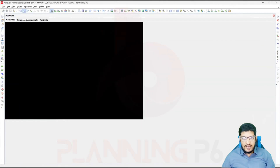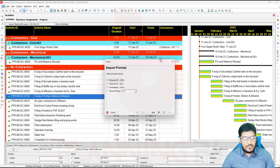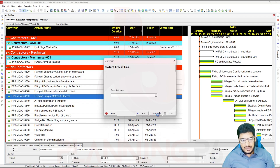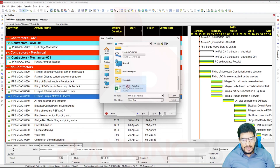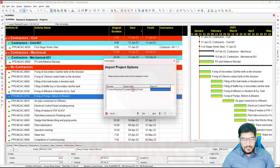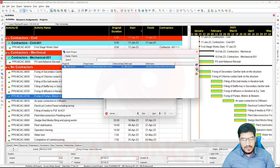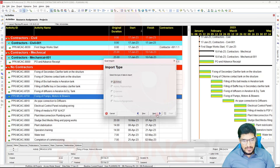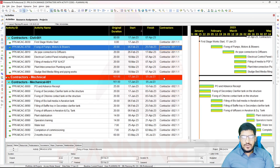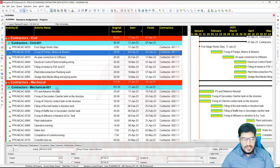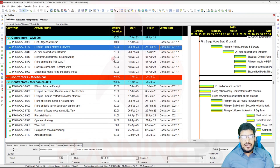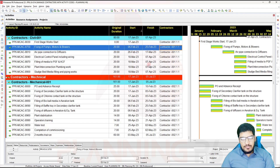After closing, I will go and import the file — XLS file. Next, select the file from the desktop. There is the file. Next, OK. Update existing project — if you select 'Create New' it will not overwrite, so I will choose Update. Activities, Next, Finish, Close. Now you can see all the values have been assigned under mechanical and civil. This is the way how you can do it. For resource assignment and other features you can use it similarly. Hopefully this tutorial will be helpful for you. Please like, share, and comment on our tutorials. Thanks for watching.